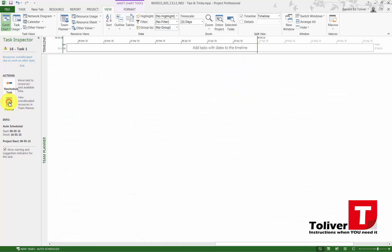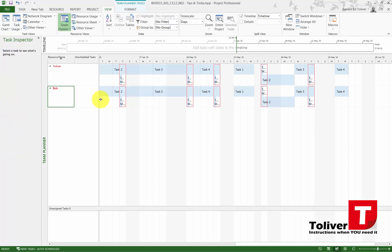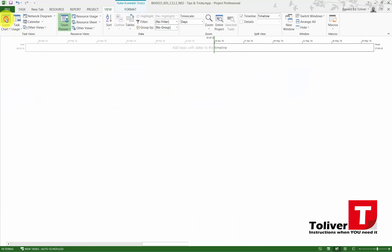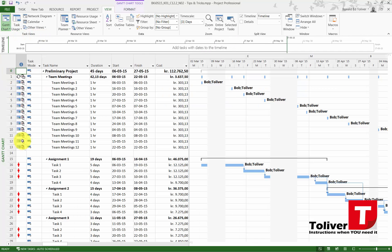By clicking on it here I can see every time that I have the team meeting my resources are over-allocated. I'm going to close this one down and return to my Gantt.